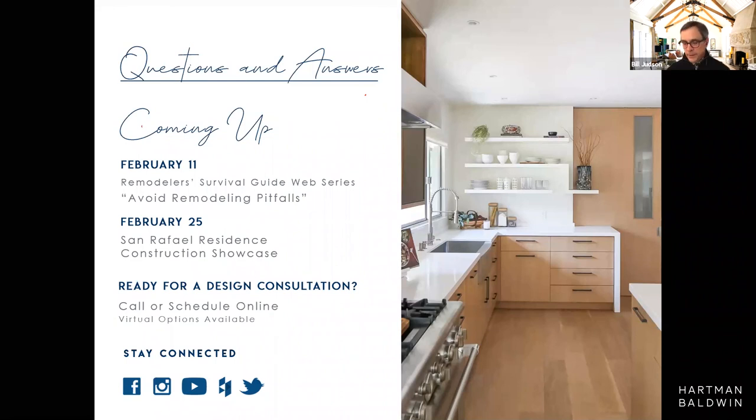Things are taking longer. If I back it up for a minute, things are taking longer at the city. Things are taking longer to get ordered. We do need to exercise a little bit of patience in COVID. People are working from home, people are getting sick. So just to give you an example, where we would see getting city approvals in a 4 to 6 week period, that period's more like about 8 to 12 weeks.